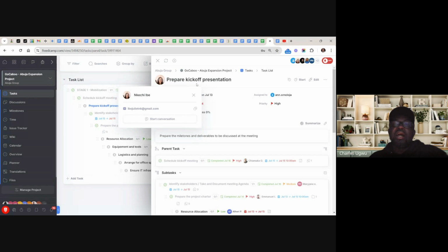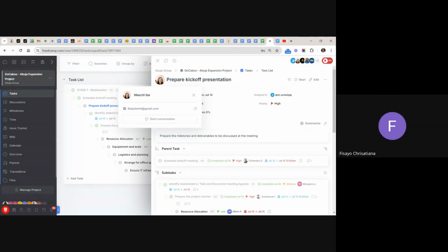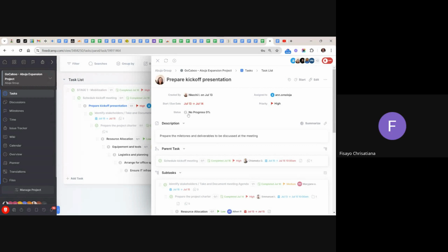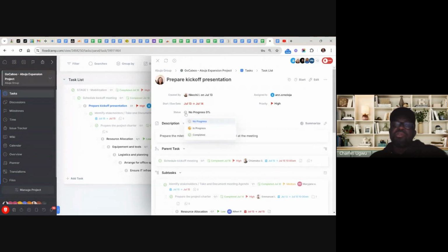The person who assigned this to Omolaja, Kechi, needs to review Omolaja's deliverables and then update the status. So that is the status here. It shouldn't be everybody updating status. We shouldn't know where we are. A person can claim that I finished my job while you have not done your job. So that's why it's not their duty. It's the person that is accountable that should be updating project status.